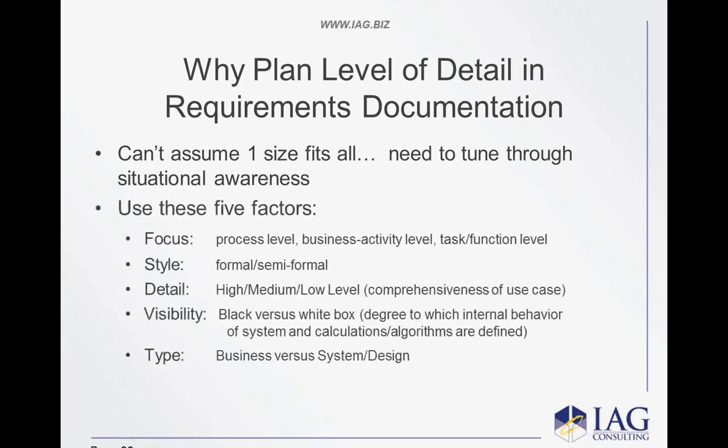And this is how you do your work planning for your analysts, okay? So if you've ever said, hey, we're going to use cases, and every single one of the analysts comes back with a different level of detail, well, this is what you do to fix it. You say, the focus in the use case is this. It's process level, business activity level, or task function level. The style: semi-formal or formal.